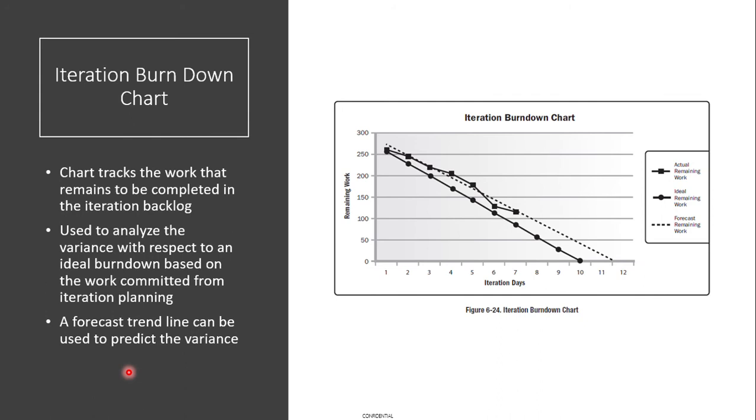One of the other tools that is commonly used is the iteration burndown chart. This can be used as a general burndown chart for a predictive model, and an iterative burndown chart from the agile method. So here, after each iteration, for example, you can find out the backlog of work to be done, the remaining work to be done, and at the inception you can plan, after n number of iterative cycles, the remaining work to get reduced in this manner.